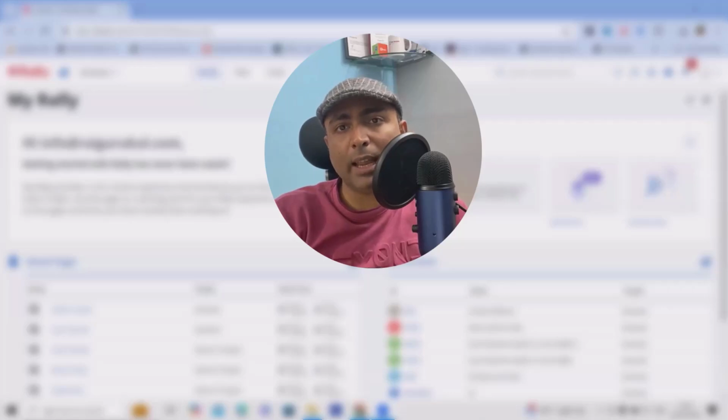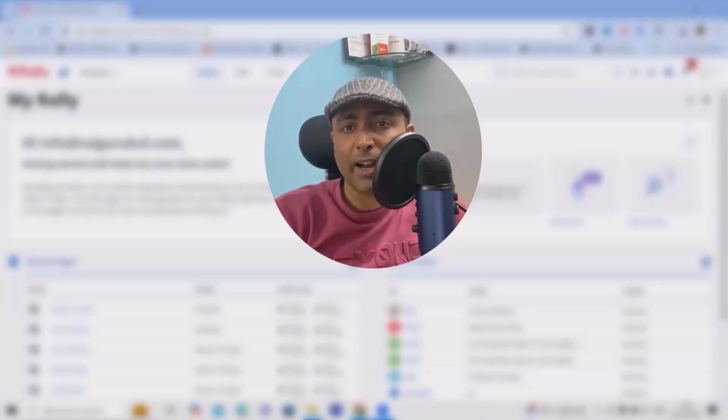Let's jump right in. So, what exactly is time boxing? In simple terms, time boxing is the process of allocating a fixed amount of time to complete a task or group of tasks. In Rally, this is done using releases, iterations, and milestones to structure your team's work within a set time frame. The idea is to set clear boundaries so that your team knows exactly what needs to be done and by when. This creates focus and drives progress, allowing you to deliver value consistently.